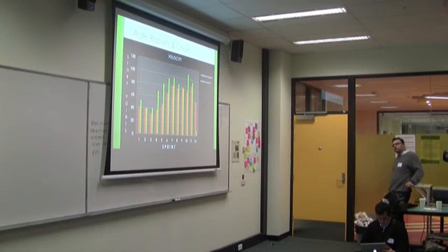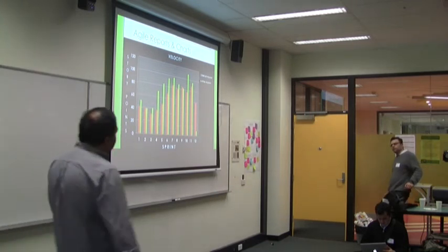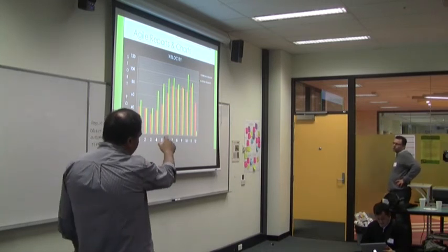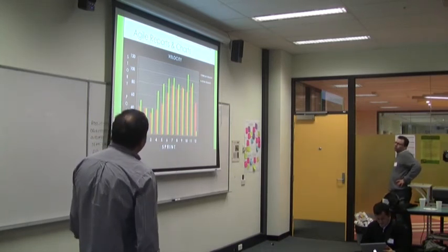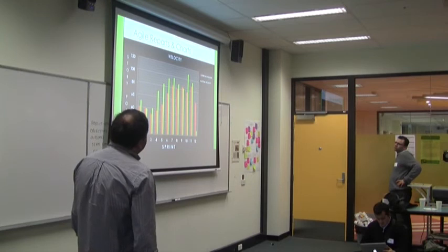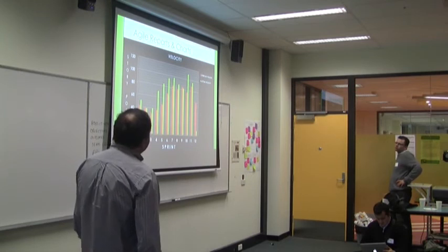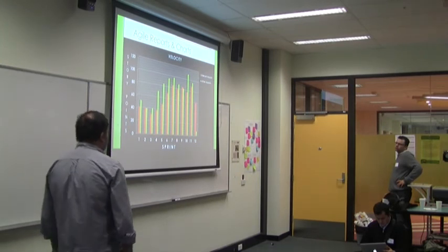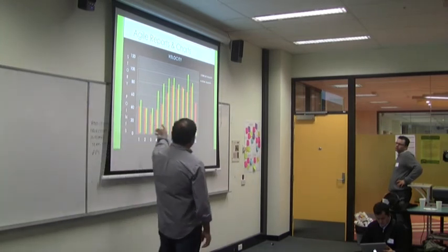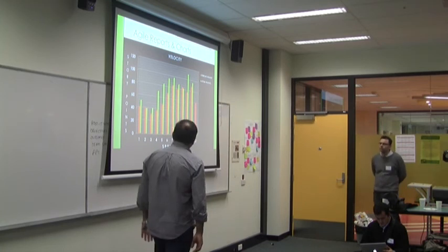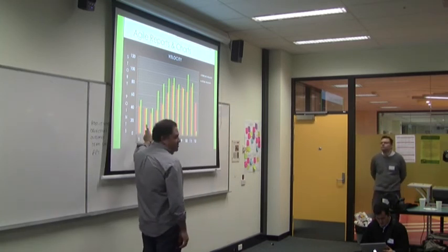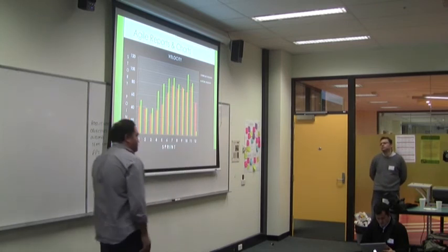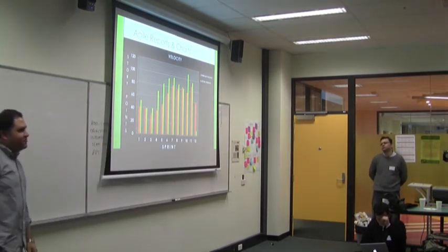Velocity, so for me, I love this because just at a glance I can see what we planned, what we delivered. Sprint 12, that was only a couple of days in from this example. One thing you think is, oh, this team's brilliant, they're actually delivering so much more than they said they would. To me, for a lot of these sprints, this team kind of sucks. And I'm the Scrum Master, so my estimation kind of sucks because with that big disparity, it just means I really couldn't work out my planning very well.